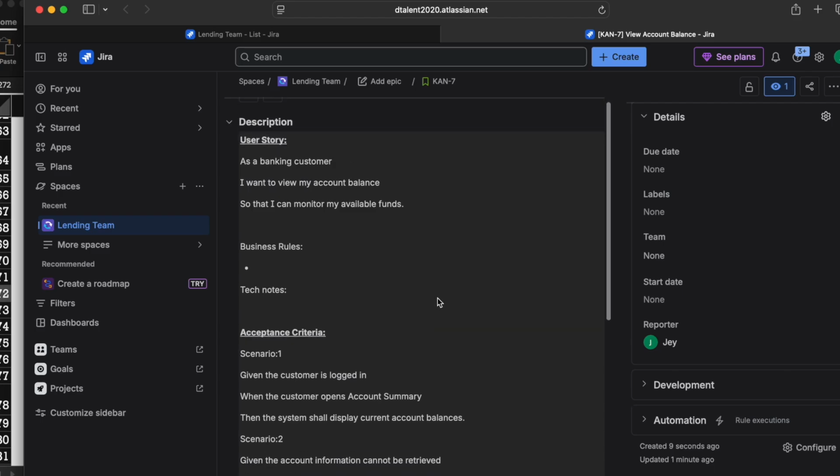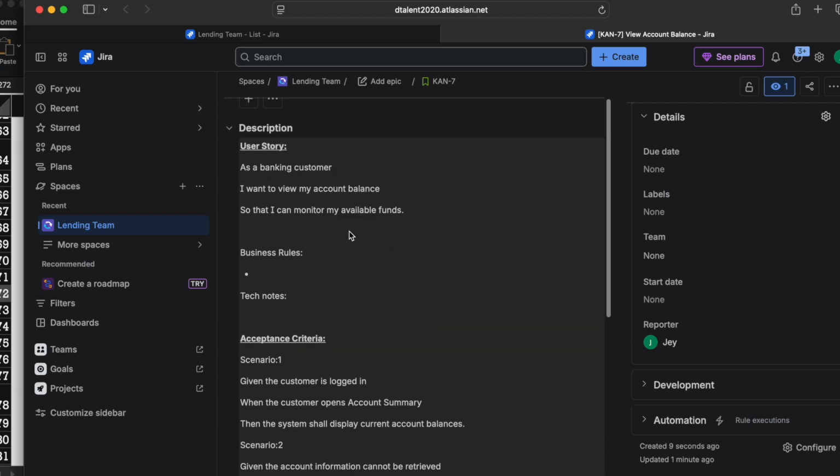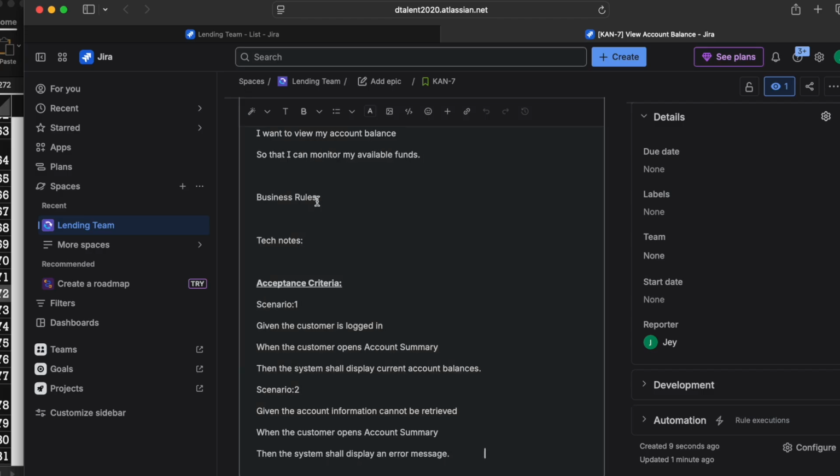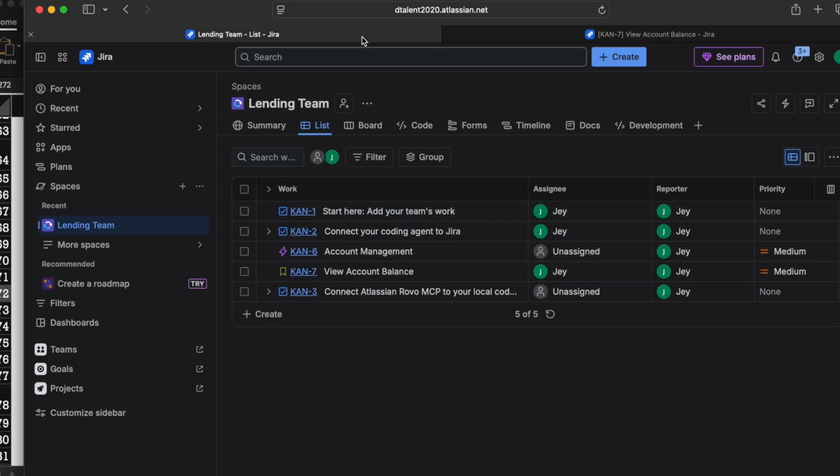So your job is to write clear requirements, provide all the information in the Jira task, the user story, and discuss with them before the sprint starts, right? If something is unclear, just put TBD or TBC, to be confirmed, and get clarification. Do not pull any user story without everything clear, otherwise it's going to take your time. Okay, so that's just a side note.